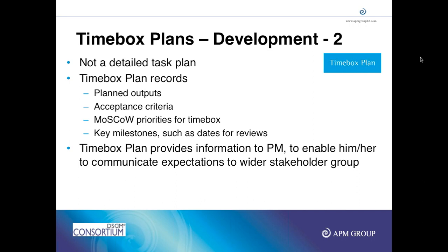Now you have various ways of doing it. You can use Microsoft Project for this, or you can use your whiteboard for this. We have something called the whiteboard technique. On the whiteboard, we have four columns: week 1, week 2, week 3, week 4. For week 1 we have Monday, Tuesday, Wednesday, Thursday, Friday, and then we show the tasks as bars.